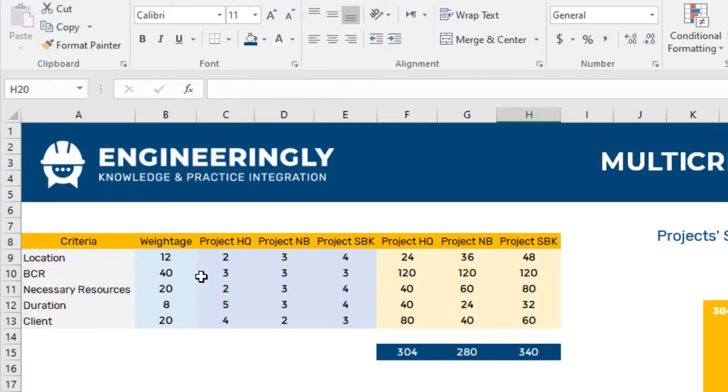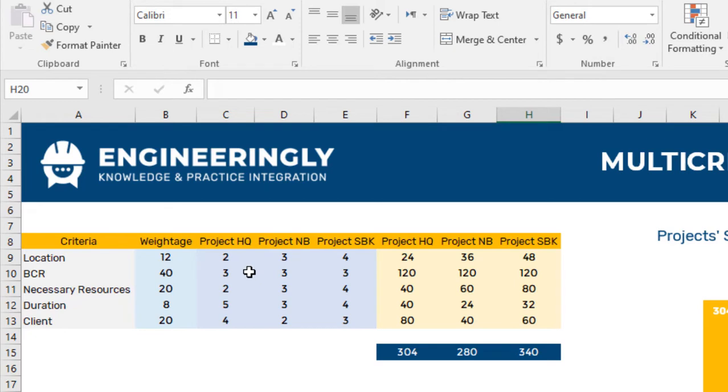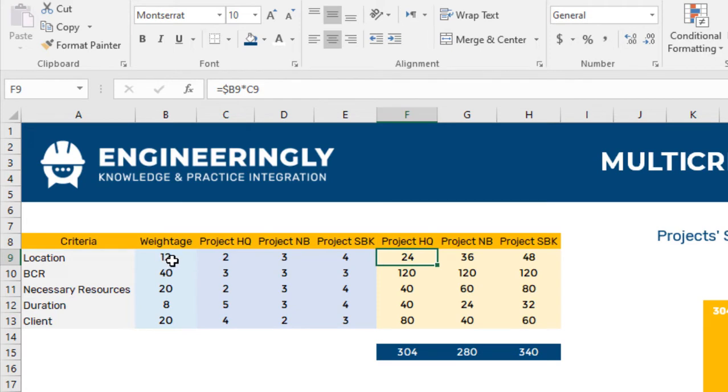Next we are going to rate our projects from 1 up to 5 based on this criteria. In here 1 is the lowest score and 5 is the highest score. Under the scoring for each project, the weightage for the criteria is multiplied by the rating for that project.